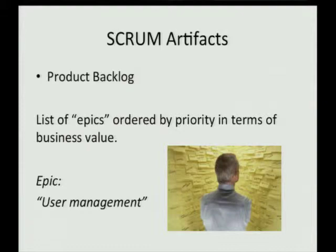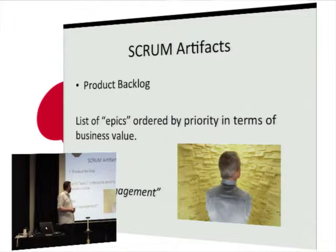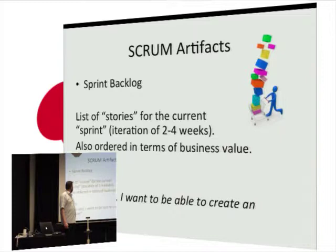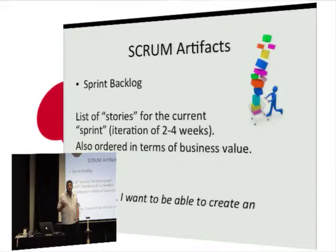For Scrum artefacts, you've got the product backlog. This starts as a list of what we call epics, always ordered by priority in terms of business value. An example epic could be implementing user management for an application. Then you've got the sprint backlog — a list of stories that fit within a sprint. An example story: as a user, I want to be able to create an account.